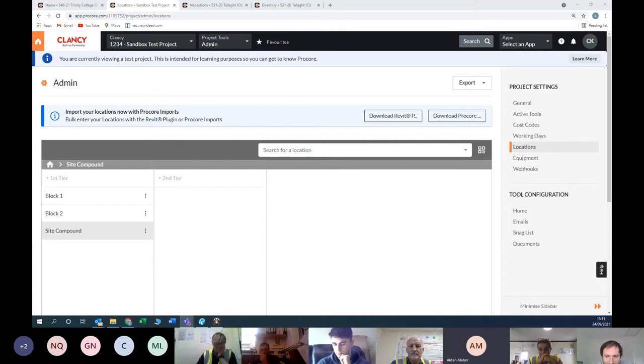So, what else is there? The only other thing is the paper, the 30-page sheets to print off those tags. That stuff comes from America, it's not actually local. So you want to allow 2 weeks and let Christine know what you're buying those stickers for, because it's like an exact brand, and otherwise it doesn't actually work. So, small things. We've put in a bulk order anyway, so that we have spares going forward. It was a problem the last few weeks. Other than that, very good.